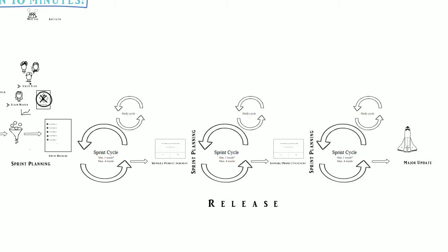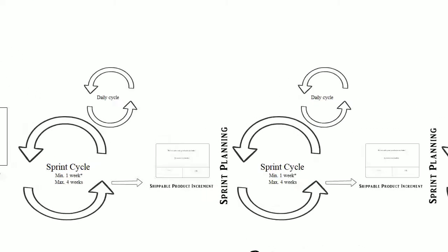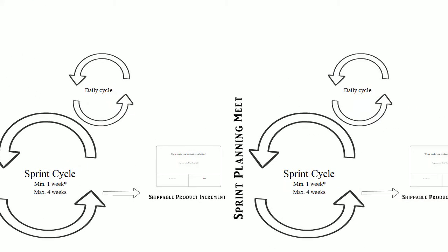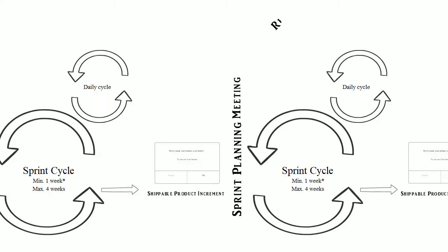Once user stories have been prioritized and refined at a high level for the upcoming sprint planning meeting, they are ready. The sprint planning meeting typically takes place on the last day of the previous sprint, in conjunction with the sprint review and the retrospective of the sprint that ended.